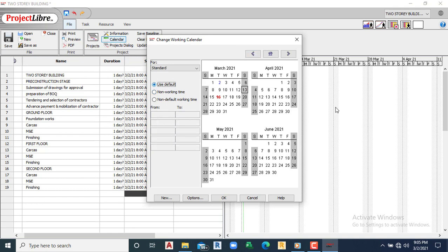This is default. Okay, so we start looking at Saturdays. We are in March, so we start looking at Saturdays. You can be clicking them one by one. By default, we are changing them to working days. All right, 8 hours, 8 to 4, then 1 hour break, then 1 to 5. So this easily you just turn them.